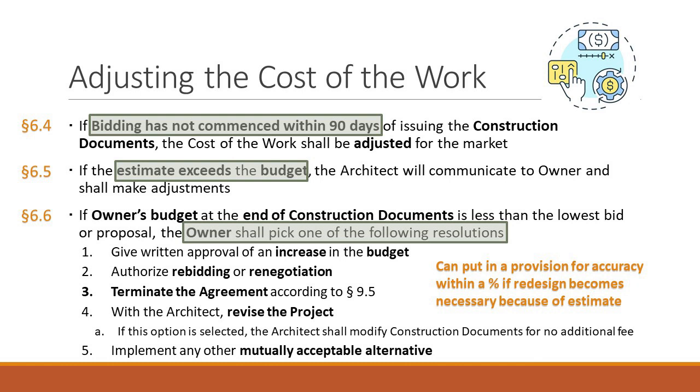And they're going to say, look, my budget was based on when I gave you the drawings. And if you waited 90 days, there's a lot of stuff that could happen that could change and affect the pricing. That was part of the COVID thing that happened with this big project of ours. The architect had been working on this thing for a couple years, and we were supposed to go out to bid right after the first of the year. But there were some changes by the owner, and so we wanted to get all the drawings right, and we wanted everything just right. And it turned out that the drawings didn't go out for bid until April 1st.